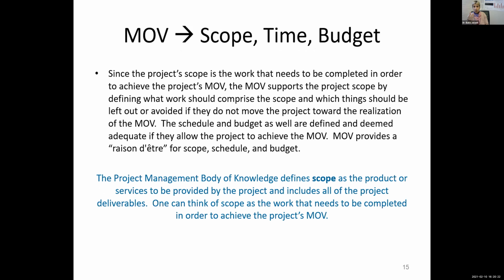So on your project charter, you're going to talk about time. What do you know about time? You created a work breakdown structure, a simple one, in your lab 1. So you're going to think about those, and about the phases that we talked about. Come up with some major phases, some major milestones, maybe 2 or 3. That's going to be your high-level planning, high-level schedule. Same for cost: some major cost-related items. That's what we need for your project charter.